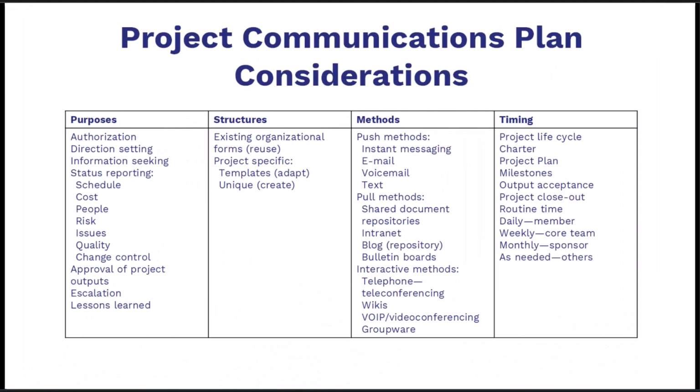Project Communications Plan. Considerations. Design communications by linking purposes, structures, methods, and timing. Purposes: authorization, direction setting, information requests, status on schedule, cost, people, risk, issues, quality, and change control. Output: approvals, escalation, lessons learned. Structures: reuse existing organizational formats, adapt project templates, and create unique artifacts when needed.